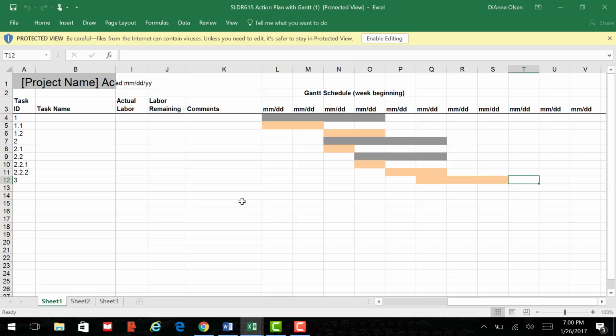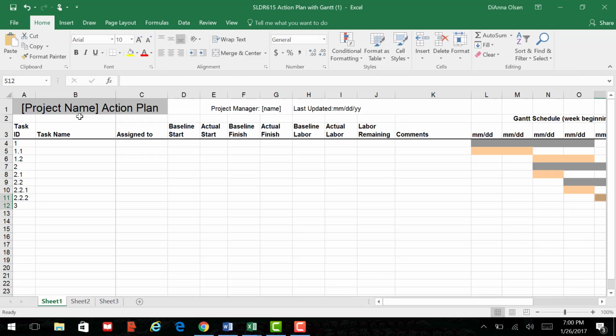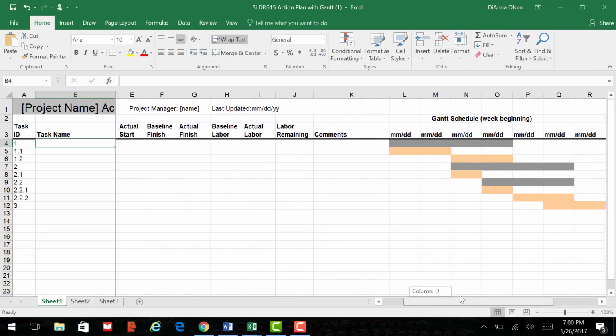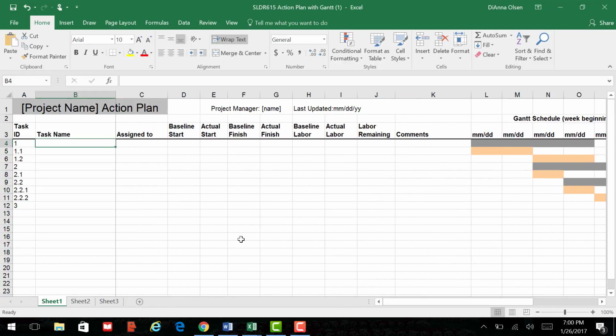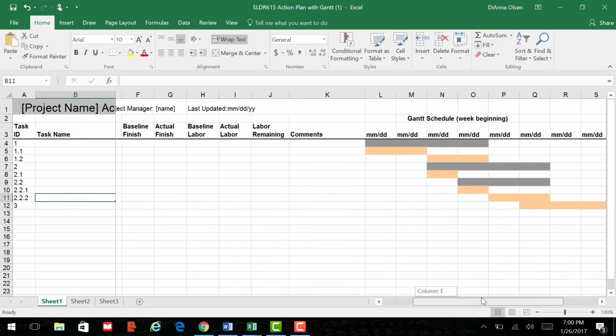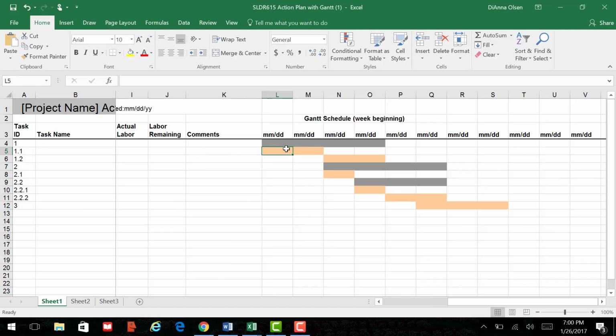So I'll give you an example. I go into businesses and help them revamp their entire financial department. We list out everything that we're going to do for them, and I literally list out every single step. Then I'm able to figure out how long each step is going to take me, and give them a realistic timeline.